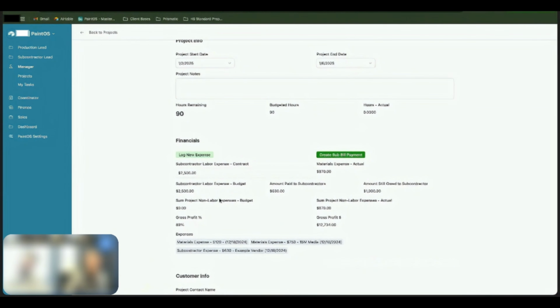We just need to pick one field that we want to update, whether it's a unit number or a total dollar amount, and it can calculate the other number. So if we say we want to do the unit, we might just have to do like 36.4, so we can talk about which ones we want, but the goal is to have, what's the total amount that they're going to get paid for it? We know our PO rate, we know the quantity, and we know what our profit will be if things go according to plan. That's the hope of what we'll see here. What will flow to the sub is just, how much am I paying you? They won't see any of the math behind it, but we're trying to make the math visible to you so you know what's going on in there.